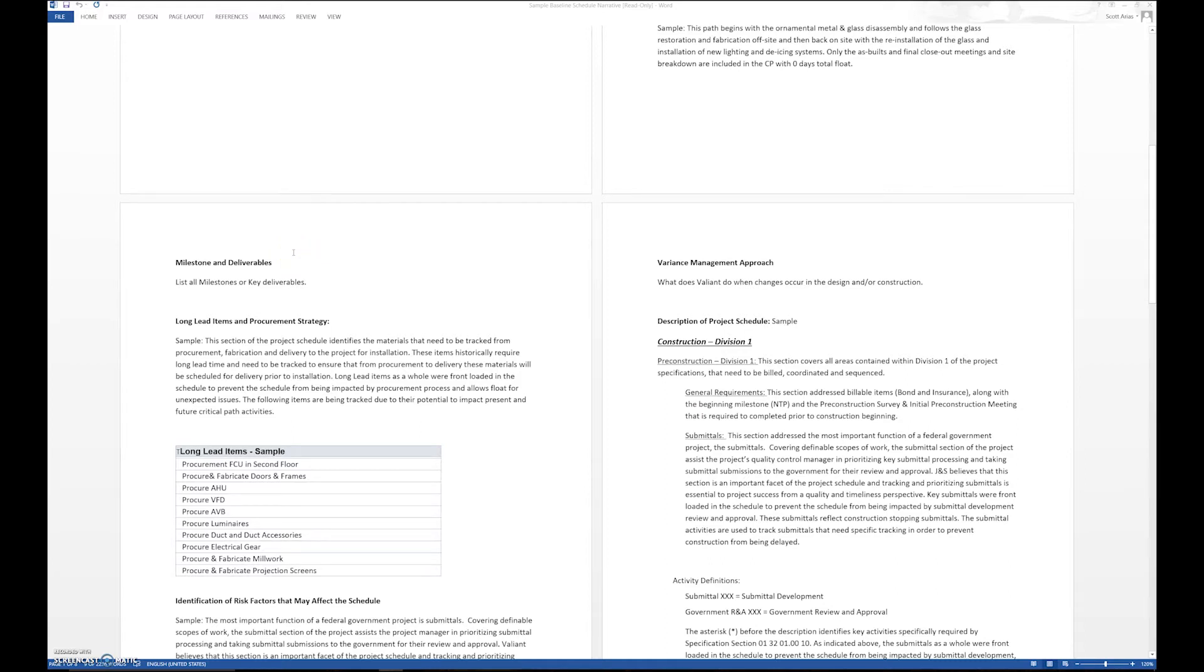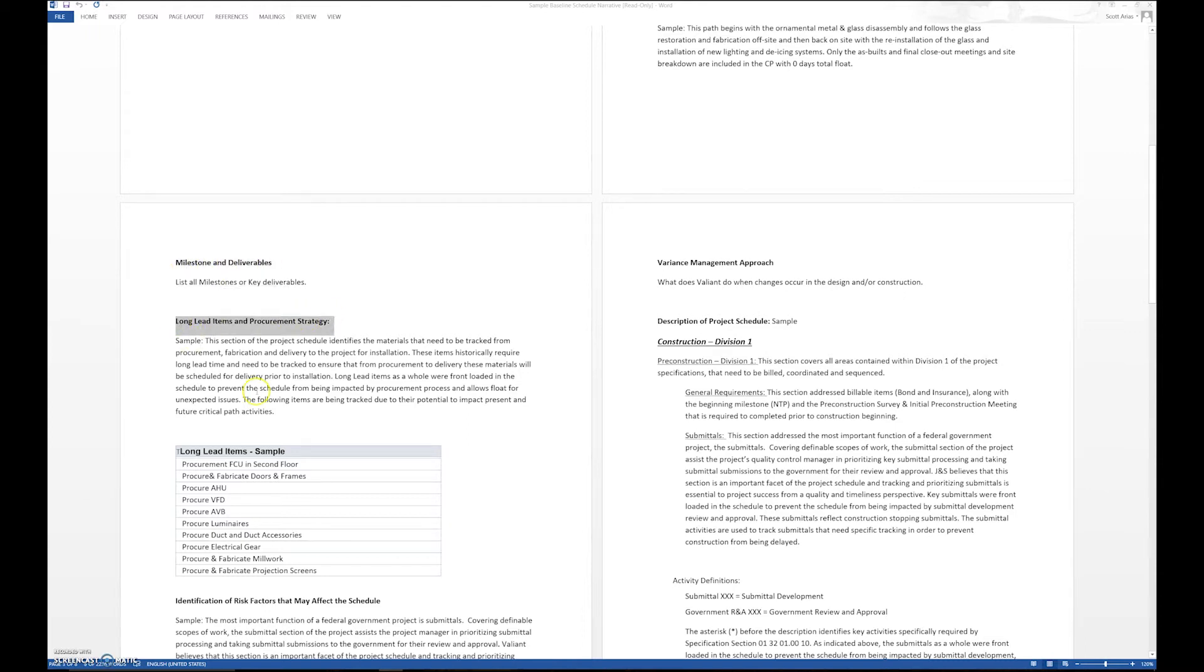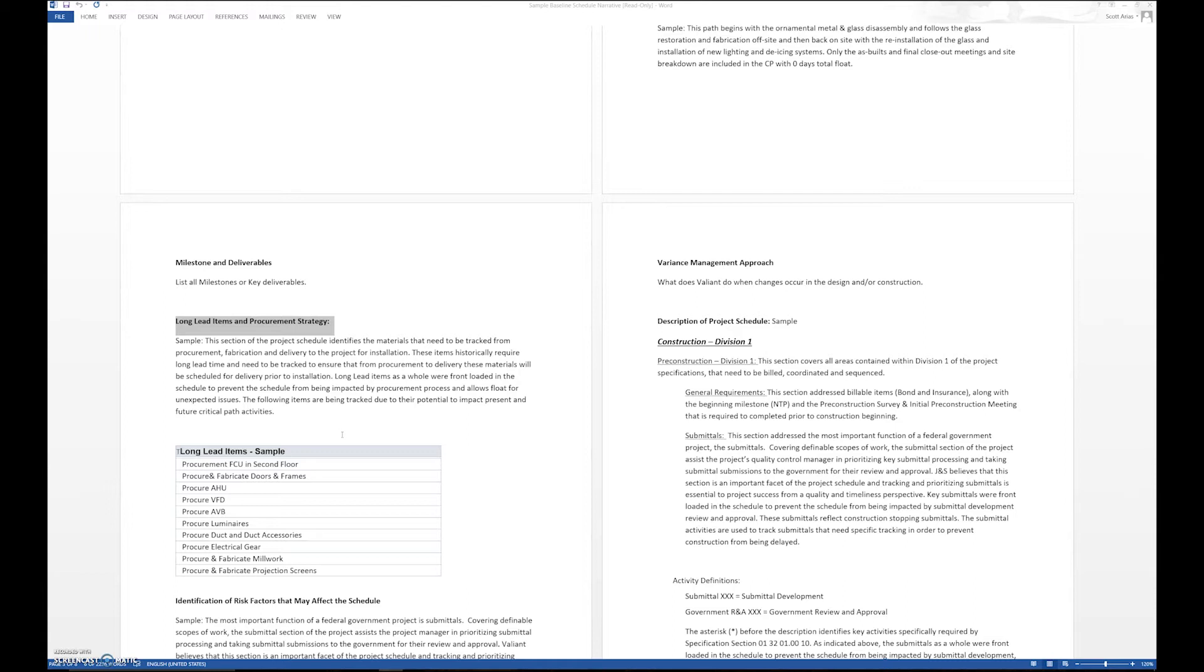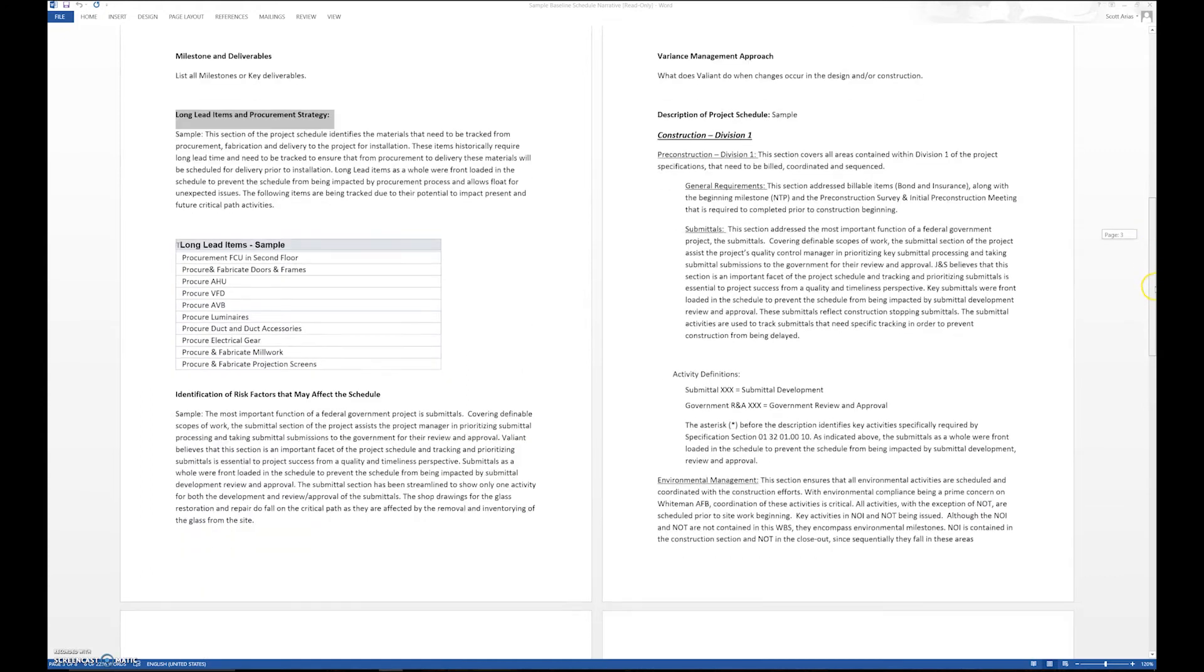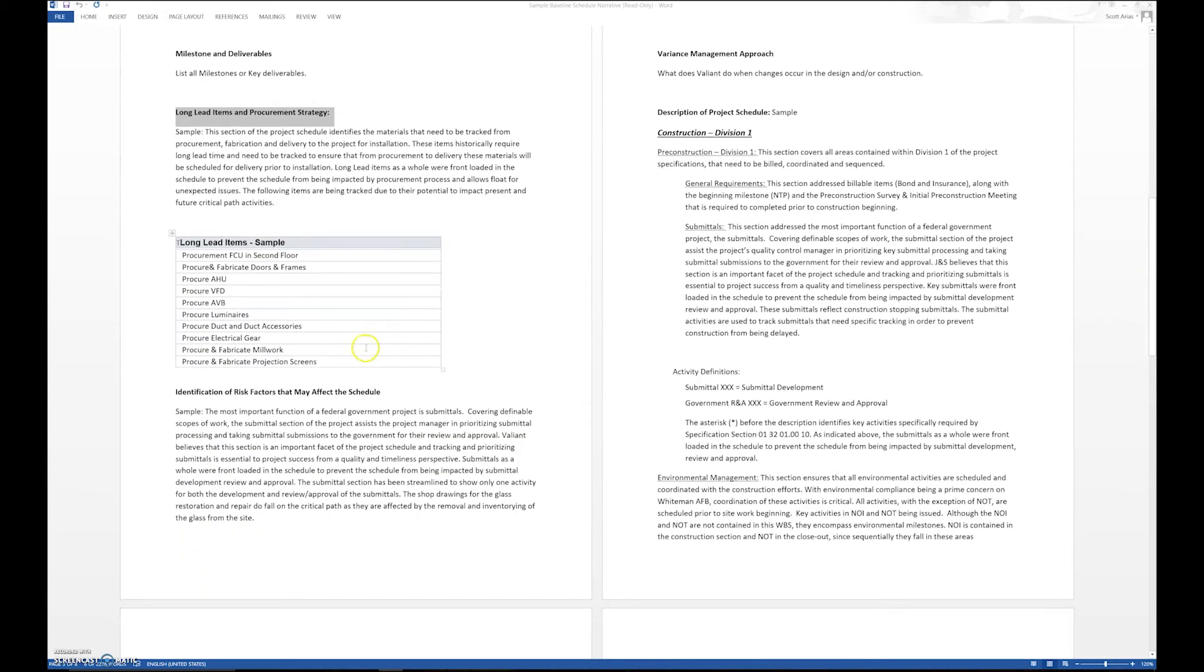Long lead items and procurement strategy: we're going to say, okay, what is going to be our procurement strategy? How are we going to go about it? How are we going to go about the submittal process? What are the long lead items that we're going to have inclusive in the schedule? We identify that right there in the narrative.